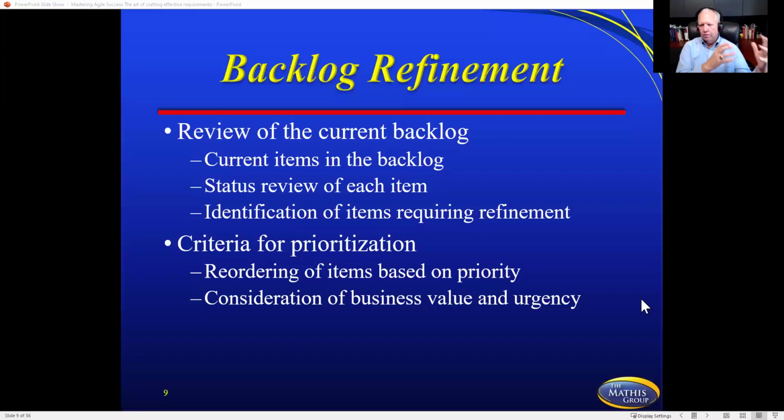Your sprint backlog is a representation from the product backlog that has been reprioritized by the product owner. And so that means that you're always working on the most important thing that the customer thinks is most important. Now, as we talk about this, we talk about it like it's cut and dry, but you know as well as I do that the team is actually negotiating with the product owner and maybe even the customer on certain items